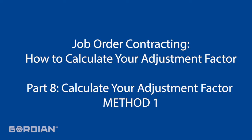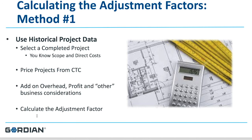So how do you calculate an adjustment factor? The easiest way is during the bidding phase: when the owner publishes their solicitation, they also publish the price book created on behalf of that agency. As a successful contractor, you have done projects in the last year or year and a half. The recommendation is to dust those projects off the shelf, pull out the proposals you created before, reprice those projects using the new price book, and see the value in the CTC.